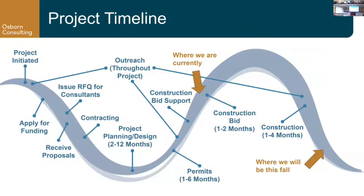And so I just wanted to show a quick timeline just how this process really works. And so we had POCD go out, initiate the project. They got funding, they reached out to homeowners, they got public involvement, and they reached out to us to help plan and prioritize what sites we wanted to go on. And then when they reached out to us, Alex actually wanted these plans shovel ready within 4 months of the RFP coming out. And so we did 10 projects in just 2 months of having the data we needed to do it, which is awesome.